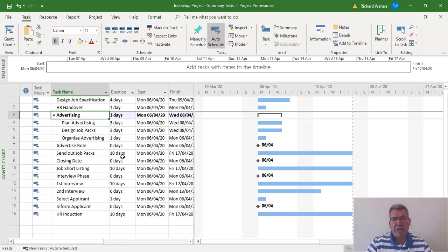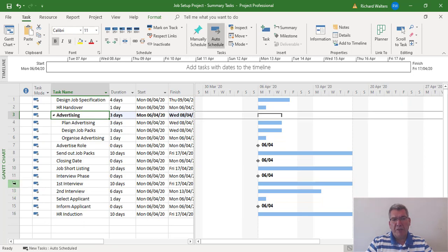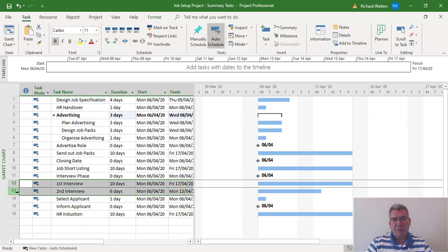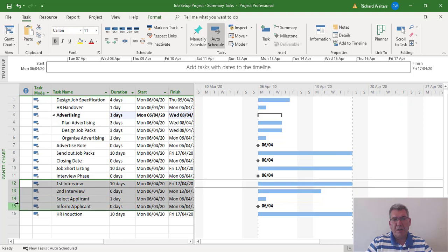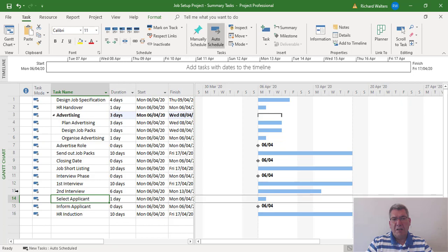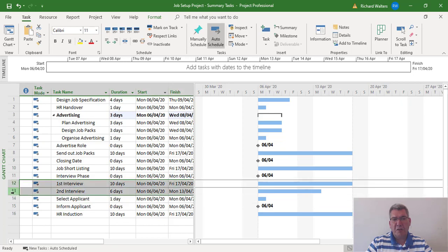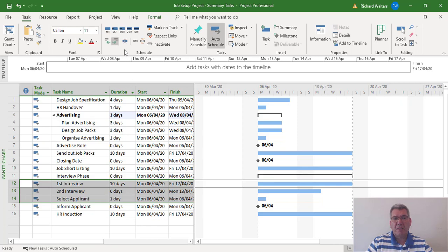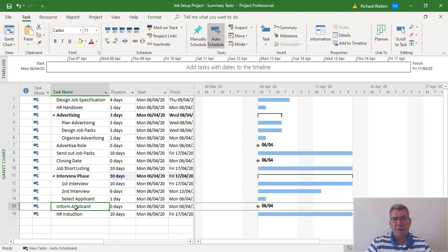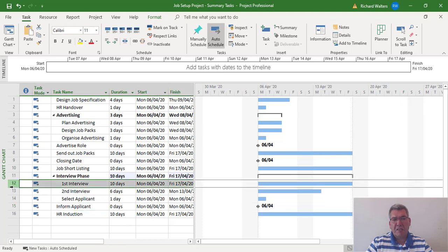Now I want to produce another summary task for the interview phase. We want interview phase to include four tasks. Let's say we accidentally only included three tasks. If that's not correct and we need the fourth one to be included, to get rid of a summary task you highlight